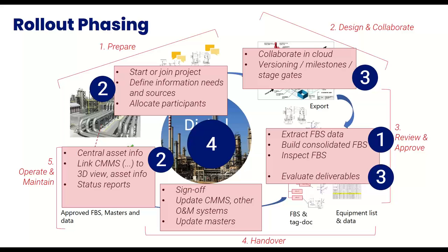Also, becoming a participant in the engineering project earlier on by inspecting early versions, for instance, of the 3D model, to see what data is there and to indicate any deficiencies in that data, so that within the project there's more time to collect the data and fill those gaps. And then in the end, the holy grail is actually doing formal sign-off on the data based on the requirements that we have.